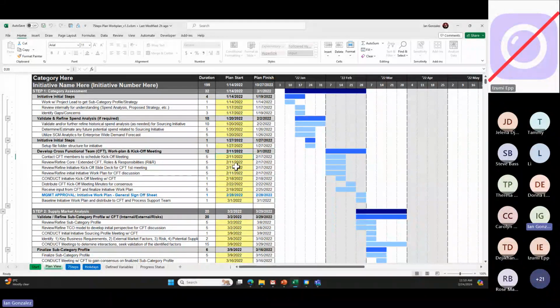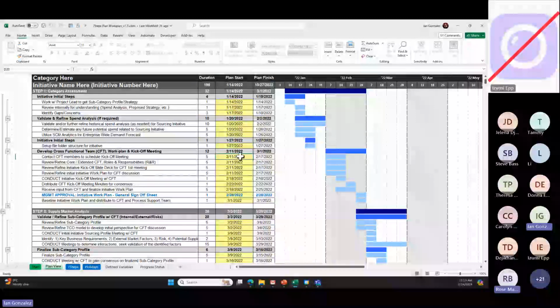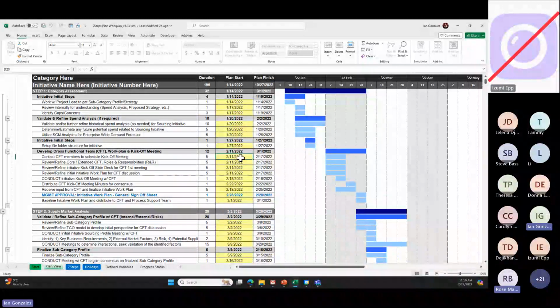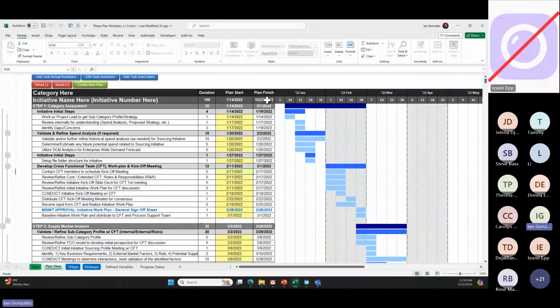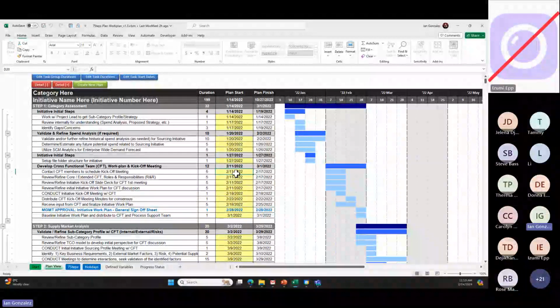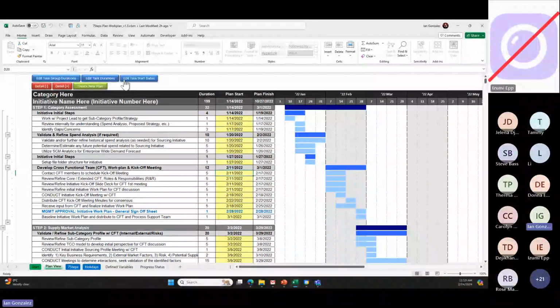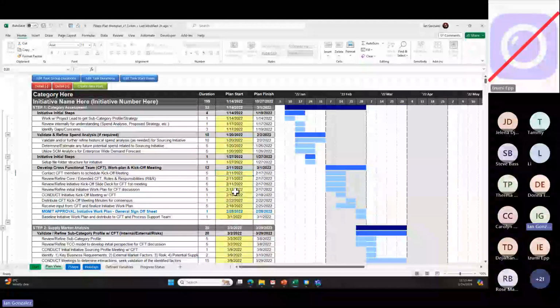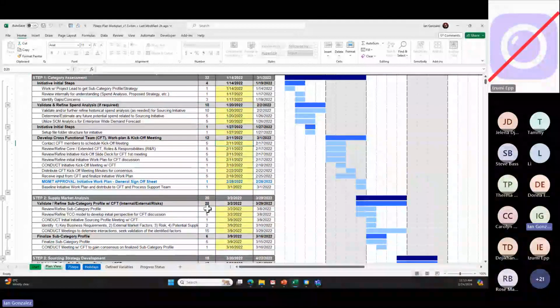It automatically said, oh, you can't work on that day. So it moved it one day ahead, Feb 11. See, there's intelligence built into this. So now my plan ends on October 27. It's moved out a little bit. So you can use the mode here, task start dates, if things change, or if things are a little smoother. So instead of this being 5 days, I did it in 3 days.